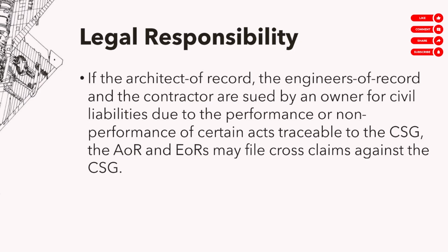Okay? Also, may karapatan yung consultants and yung contractor to cross-sue, to sue the CSG for acts traceable to the CSG. Sample, nag-collapse yung building during the first 15 years and na-trace na may mali sa structural plans. Okay? And then pinlame yung structural engineers, sinampahan ng kaso, and then ang defense ng structural engineer was, yes, may mali sa plano, but I was able to correct that. I was able to revise the plans. I gave it to the CSG, and the CSG said the issue niya sa contractor. Pero it turned out, hindi pala na-delay sa contractor yun daw eh.